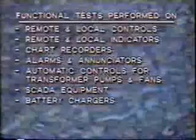Functional testing will also need to be performed on other related items which are not truly part of the protection system. Depending upon the particular installation, these items may include remote and local controls, remote and local indicators, chart recorders such as oscillographs and sequence of events recorders, alarms and annunciators for all equipment, automatic controls for transformer pumps and fans, SCADA equipment, battery chargers, metering, carrier and tone equipment.